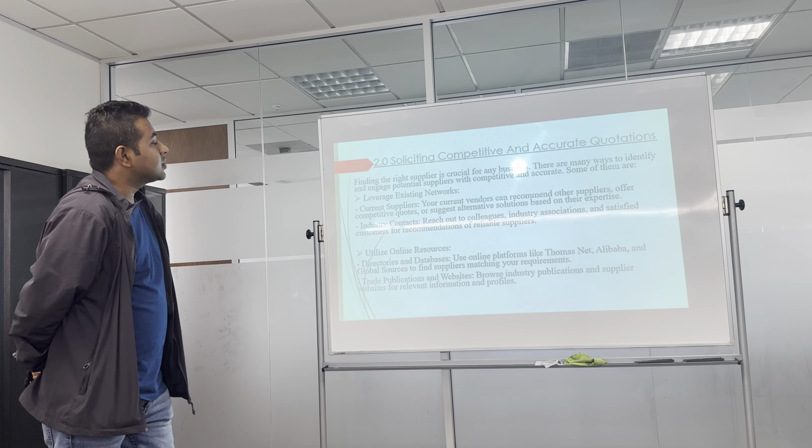Sustainability. When evaluating quotation in construction, it is important to consider the contractor's environmental policy and environmental management plan, as well as their sustainability record, which helps in minimizing environmental impact and promoting sustainability in construction projects. Capability and time frame. When reviewing quotation for a construction project, check if the contractor has the skill, resources and capacity to do the job as specified. Look at their current workload, technical abilities and equipment condition. Ensure they can complete the project on time and meet the tender specification, as well as have relevant experience in a similar nature of tender.